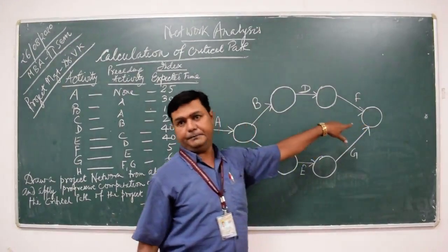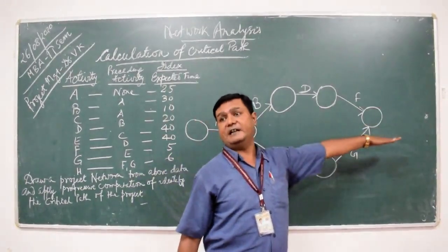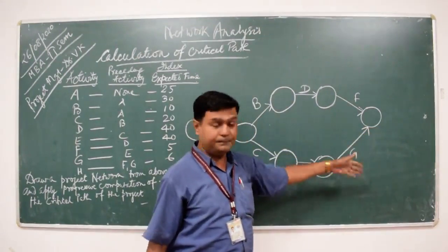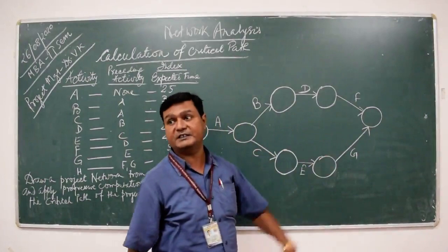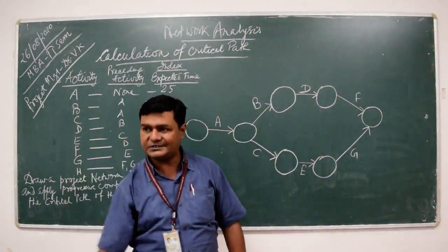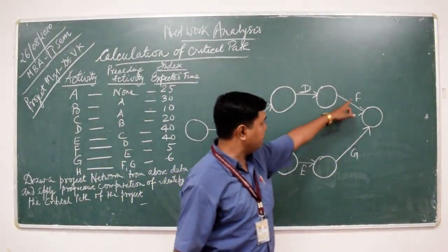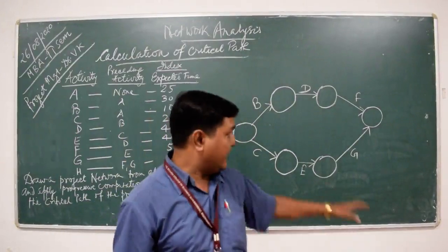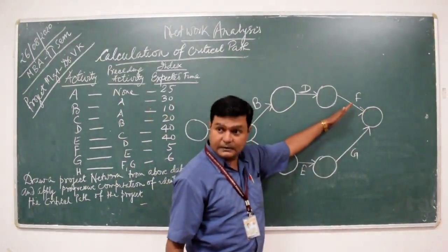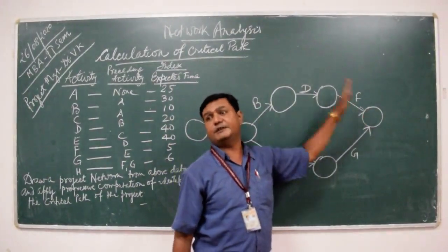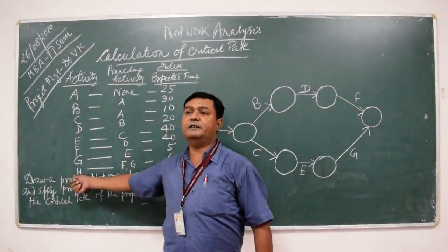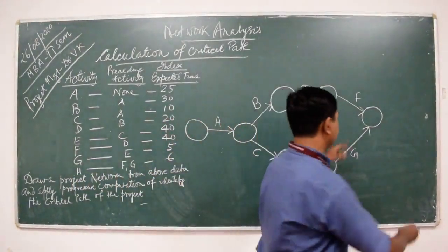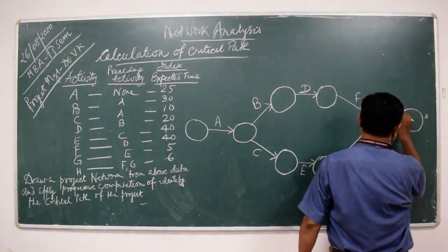For a beginner, it may be possible that they make an independent arrow for each activity, but in the next step they have to merge both activities, because the condition says that activity H will not start until activities F and G both terminate into the same event. That's why I have ended both activities F and G in this particular event. Now we are ready to draw the final activity, H, which is preceded by F and G. So this is H.